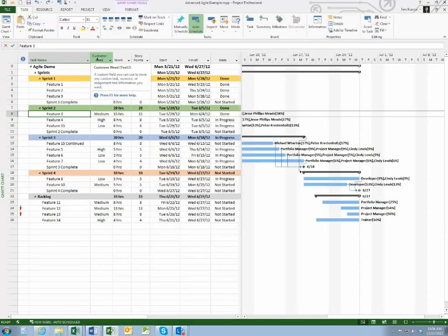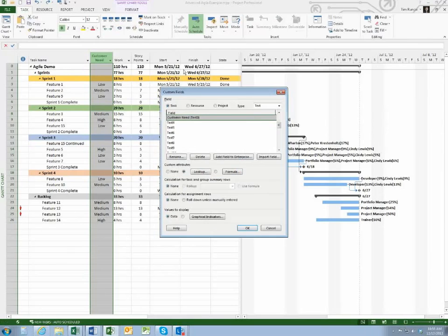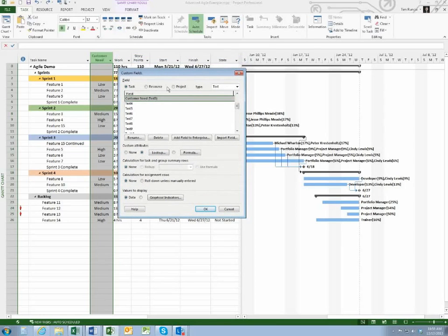So if I add this directly to this view, and I set the default value, which is, hey, most everything comes in at medium priority, I can click on that, set as default, and then as I add new features or tasks, this will automatically fill in without having to manually type that in. These activities allow us to come in, and what's important here is to add this in terms of a drop-down. And let me zoom that so we can all see it. But inherently, we've got a great-looking view that allows us to standardize the metrics that we pull inside of here.